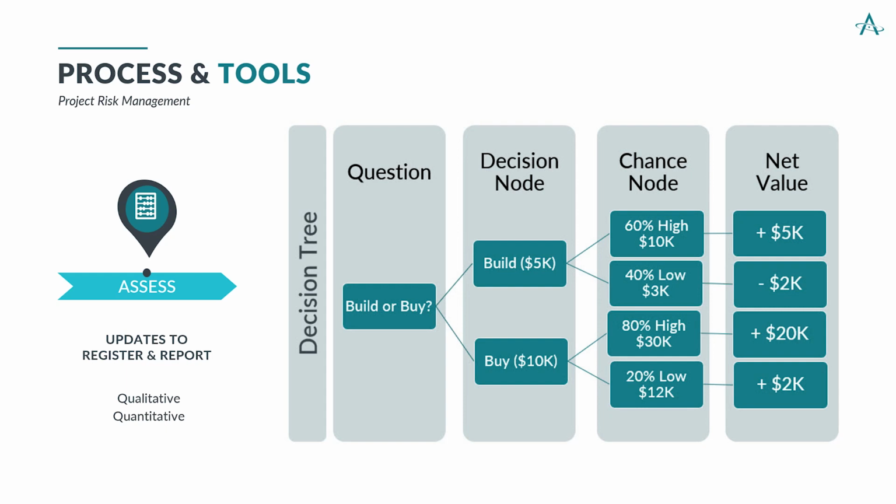And again, just to be thorough, what happens if it doesn't work as expected? Well, we would at least gain a revenue of 12,000, the difference being 2,000. Now, that net value is very helpful and a good way to lay it out and say, a lot more risky on the build side with that negative. Though on this end, we're not necessarily going to promise to get the big payout. We might just get a small payout. So you can rank the decisions against one another.